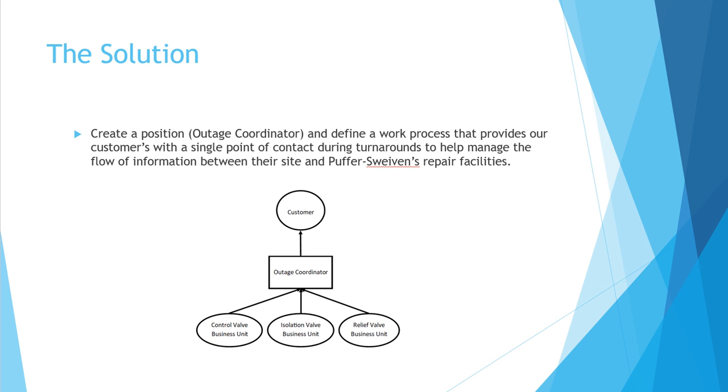So our solution: giving our customers a single point of contact for the duration of their turnaround. We call this person an outage coordinator. This person's sole responsibility is to provide daily status updates to the customer on their valves, including where they are in our repair process and when they can expect them back at their site.